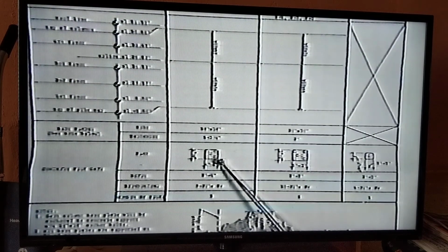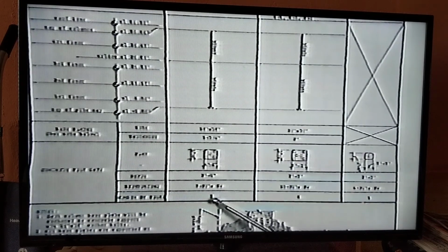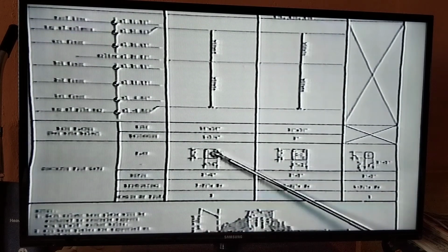So if the cover here were 2 inches, each number 9 would be 4 feet long. And so we'd have 7 of them going one way and 7 of them going another way. We also have to notice that they tell us how many piles are in here. And notice we can see that by seeing the number of circles.